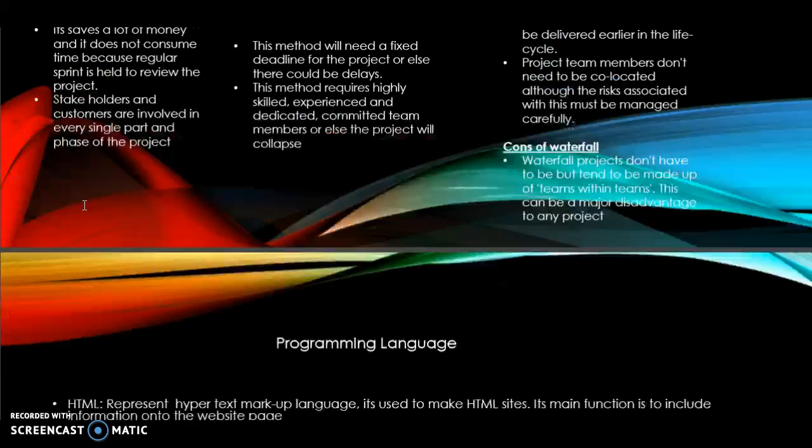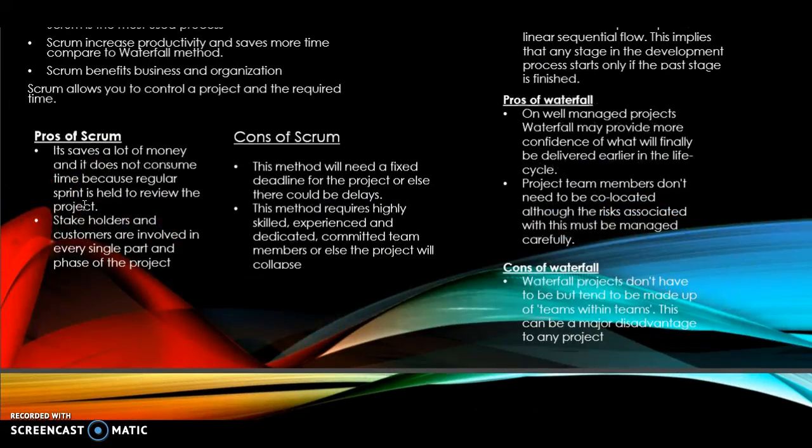Another disadvantage of Waterfall is software isn't delivered until late. So the project has to be completed through 4 phases before the coding actually begins. As a result, stakeholders won't see working software until later in its life cycle. So that's a downfall. Let's imagine the stakeholders didn't like anything about it, they can't really see it until the actual project is completed. That's when they can see the actual software.